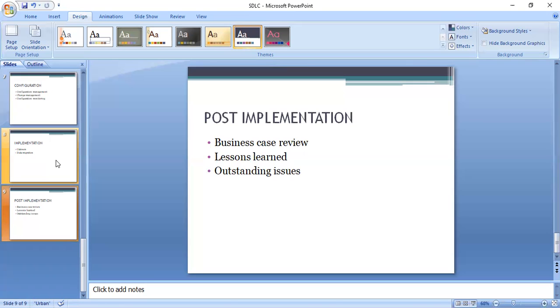We have a new system, we've stabilized. Then we can do post-implementation review. Post-implementation review basically is you create a team to look at the software, the business case. Are we really achieving what we were told we are going to achieve in the project feasibility study stage?